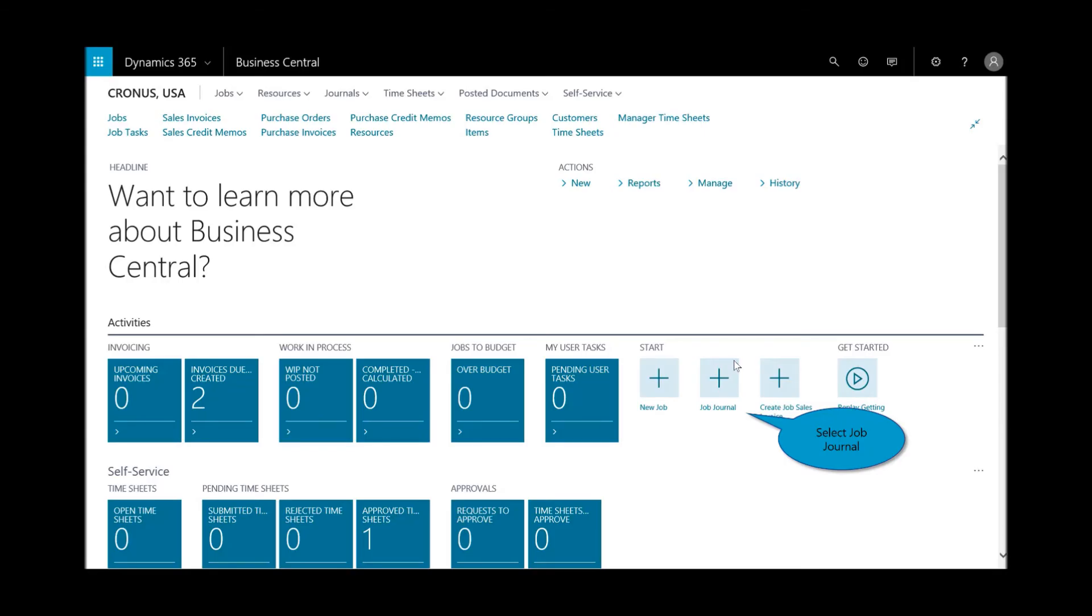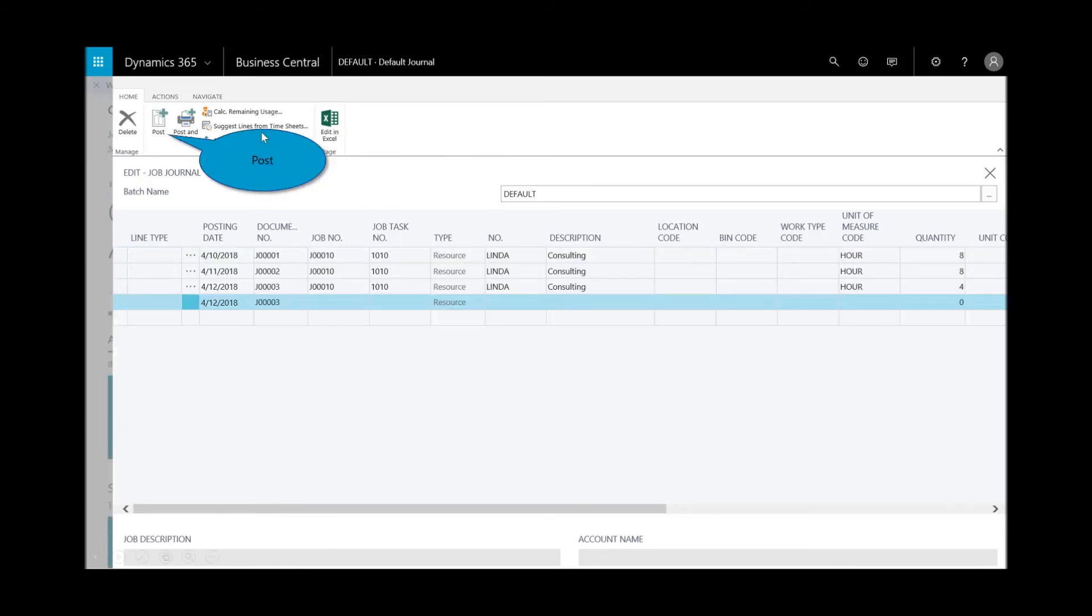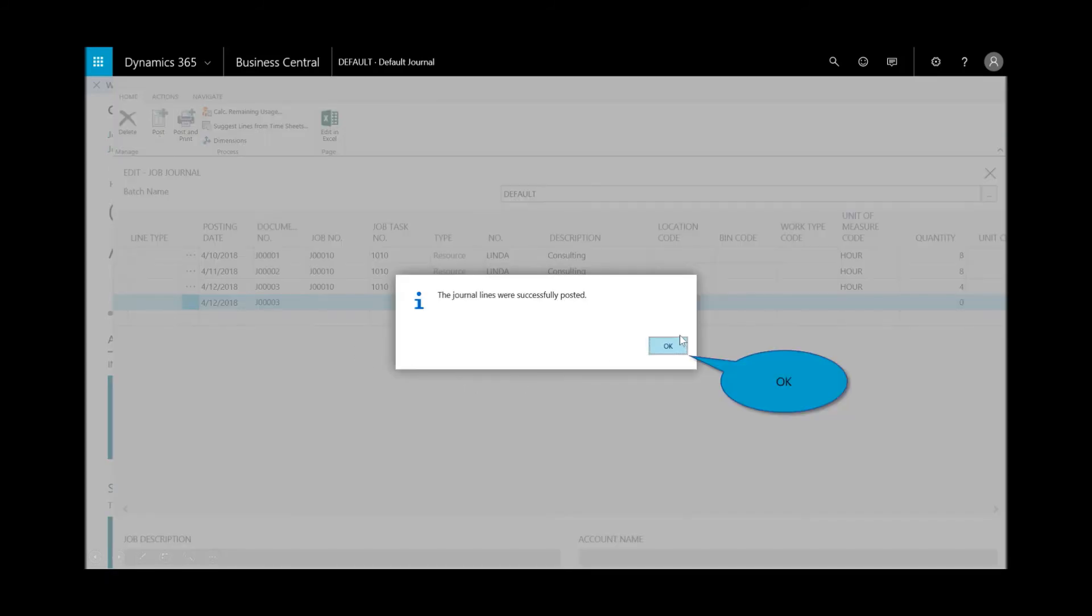Now I need to go and create the job journal. From right here, the shortcuts, I could just do a quick job journal. I want to go ahead and bring in those timesheets. Since the time has been submitted and approved, I just want to leverage the built-in capability of the application to auto-suggest those timesheets. And it brought it in. Eight hours on the right, eight, and then another four. Then simply post those journal lines.